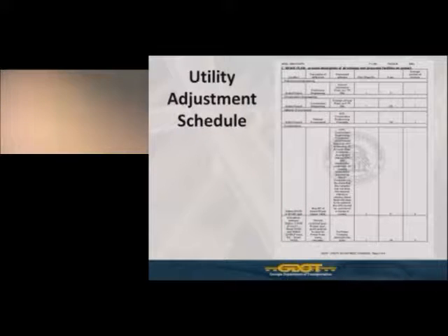Now this is the work plan, the detailed work plan for this project. If you notice preliminary engineering, it shows 7 days, 1 worker, and of course this project may not have staging plans. It shows all stages 1. And again, keep in mind, if the DOT project has staging plans and you're doing work in, say, stage 1 and then maybe stage 3, that work during each of those stages should be accurately reflected in this work plan. But in this case, everything's occurring in stage 1, and if there are no staging plans, then that's stage 1 anyway.